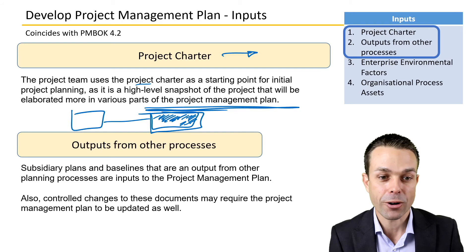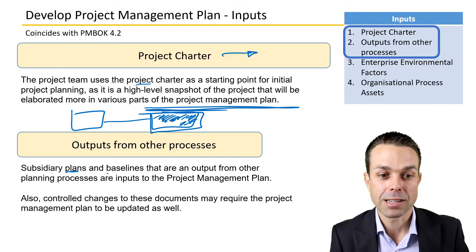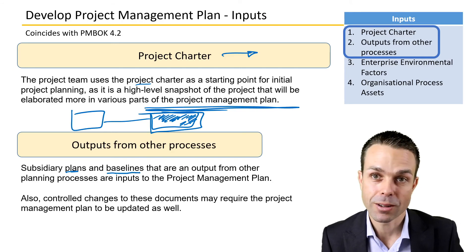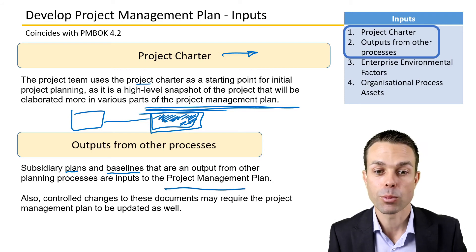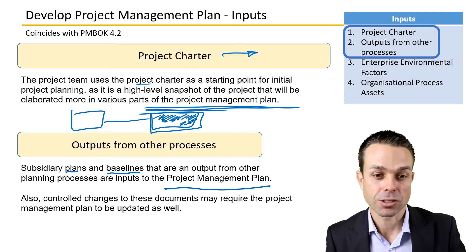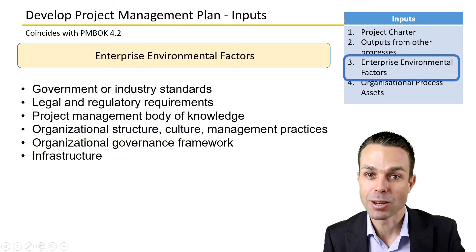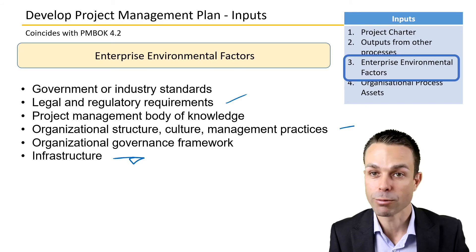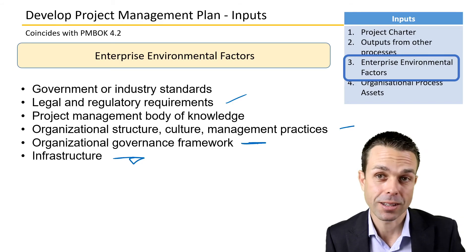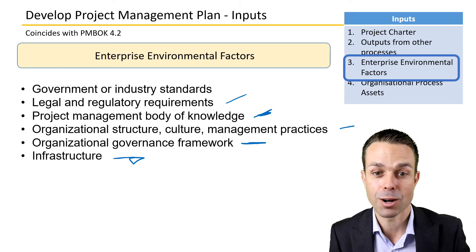Outputs from other processes — subsidiary plans such as the risk plan, quality plan, schedule plan, and cost plan — and any baselined documents also go into the project management plan. Controlled changes to these documents may require updates to the project management plan as well. Enterprise environmental factors include legal regulations, organizational structure, the infrastructure you're working in, and organizational governance frameworks.